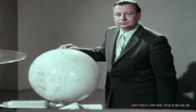We are presently under direction by NASA to consider for the first three test flights ascent into a 300 nautical mile parking orbit and from there into a 3,000 nautical mile orbit. For these flights, we will be using the Mercury net. The flights will be undertaken according to the present schedule in June, September, and December 1961.